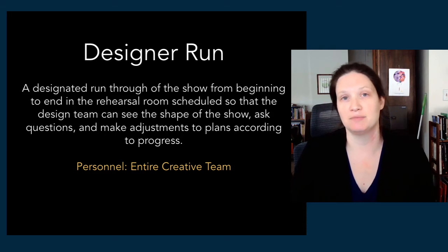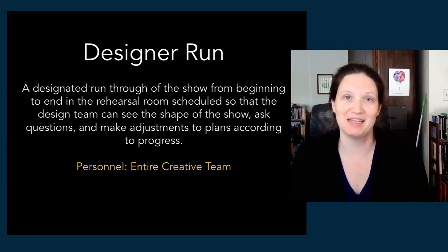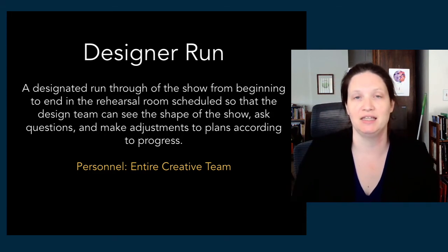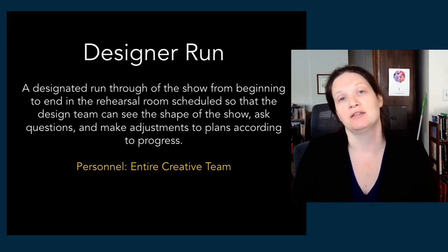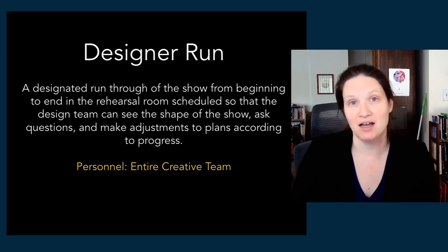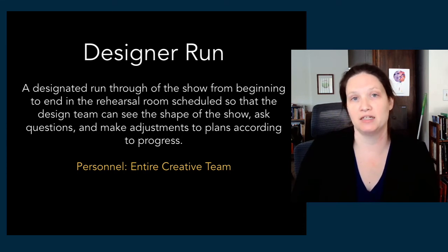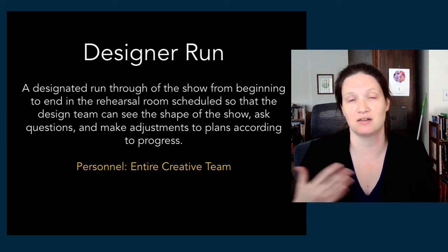So oftentimes things are discovered in the staging of the play that may not have been evident in the initial scenic drawings. And so once the play is staged, the lighting designer has a much better idea of what is going to happen, where the people are going to be on the stage for the various scenes. And so they can make fine-tune adjustments to their plot so that they can submit a final plot before the load-in of the show. They'll also be able to build cue sheets and other stuff like that.